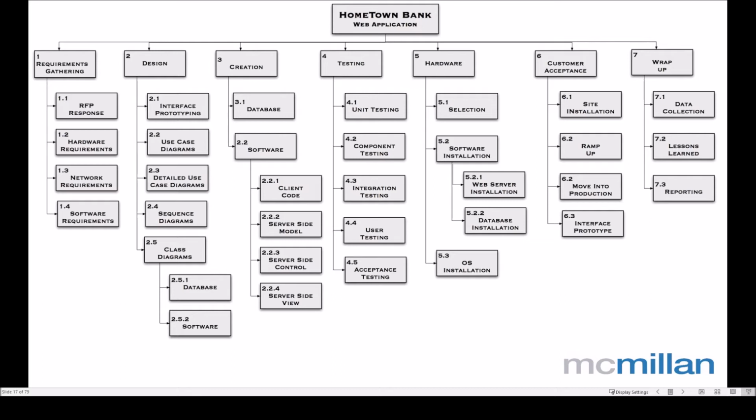So for us in this case, and in the context of what I talk about, where we're ultimately responsible for all of the project, our decomposition of task activities would go down to the level of detail that we need so that we're clear about what needs to be done. So we break down all these deliverables, activities and tasks. We would then consult as part of that process. We'd talk to the project team if they've got any experience. We'd look at any historical documentation. We might consult outside of the organization, to industry.